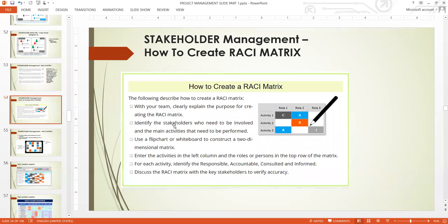Because at times, if roles are not defined, you'll be seeing some people overlapping, doing other people's jobs. They have not finished their own and they want to overlap and do other people's, you see people clashing all the time. But when it's defined using RACI, everybody knows their lane. They know what they are doing. So when you clearly explain the purpose, identify stakeholders who need to be involved and the main activity that they need to perform. Use a flip chart or a whiteboard to construct a